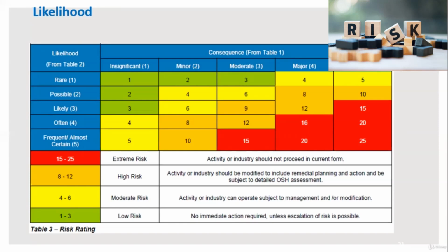So it will be the allowed column where you can work if the risk is available in that column. So all your activity will fall in these numbered columns of 1 to 25. These activities are quantified in those numbers. Instead of these numbers, you will write your activity in those columns, and you will be able to provide permission if it is falling in the yellow column, and only one amber column, that is the number 9 column, the work is allowed to do that. That is also with additional control measures.